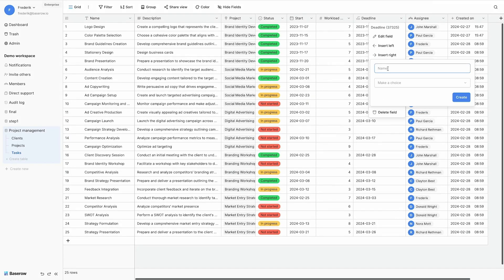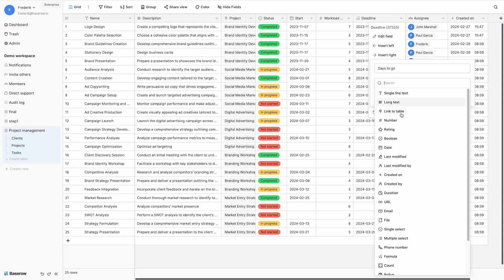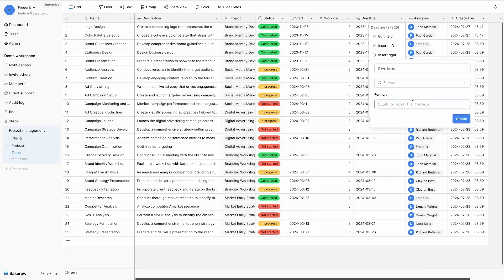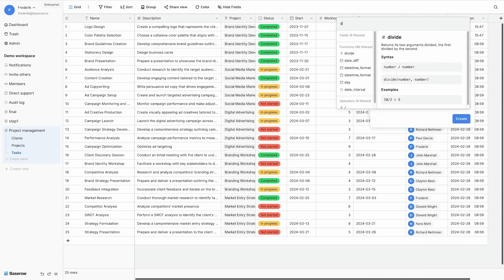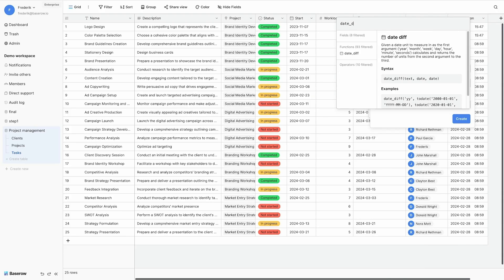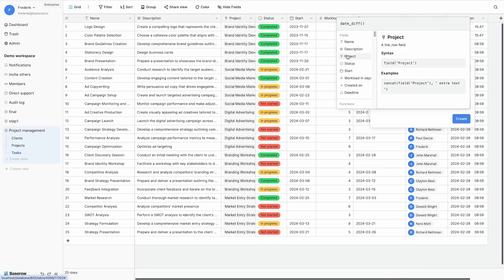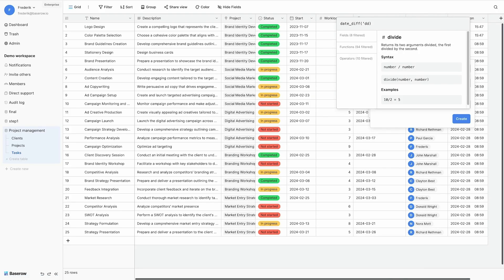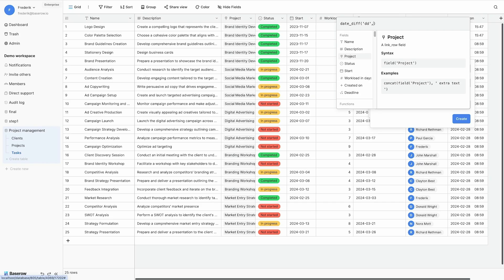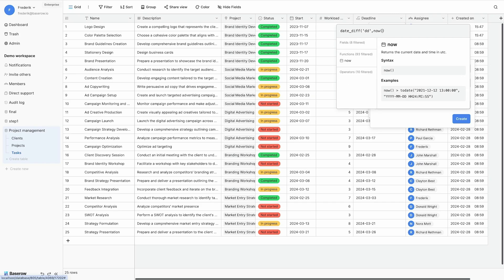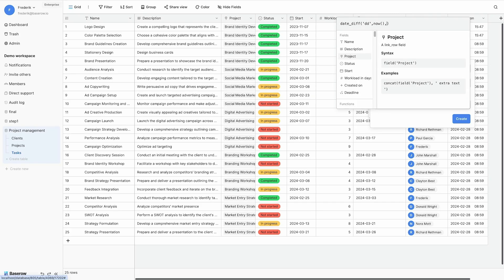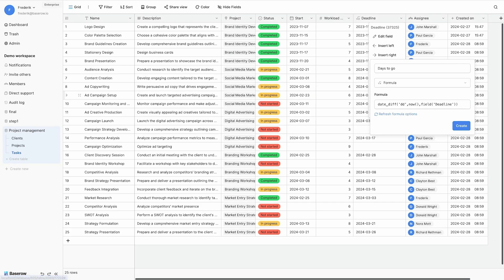Next, I want to know how many days to go for a task. It's again a formula. And I will use the dateDiff function. Express it in days. And calculate the difference between now and deadline.